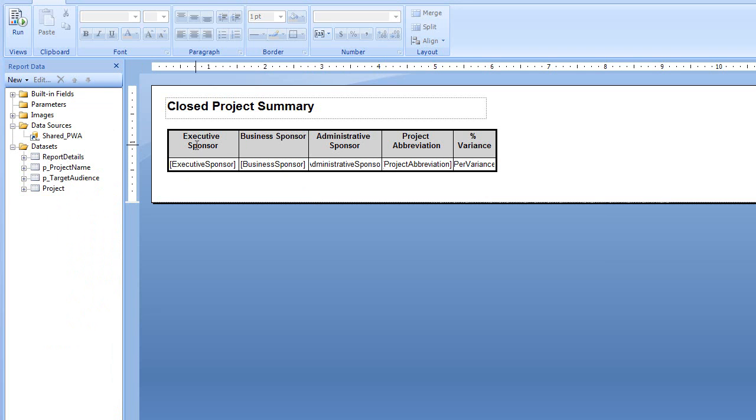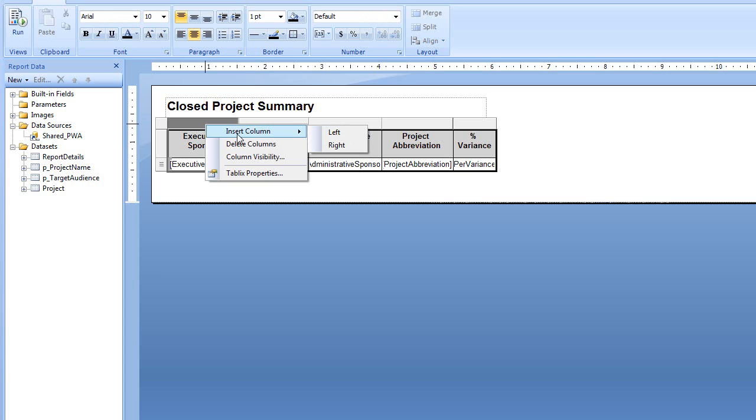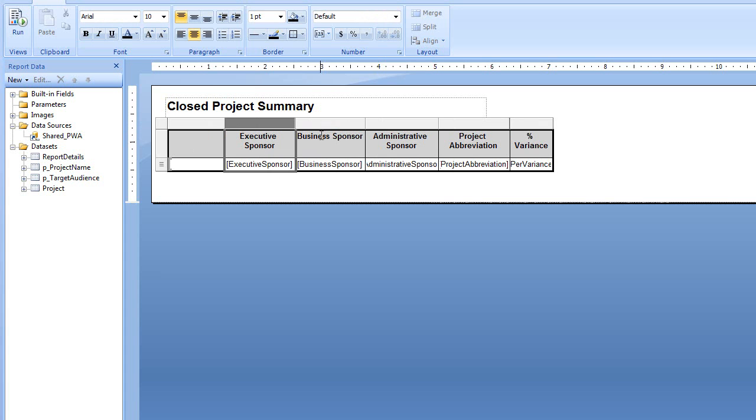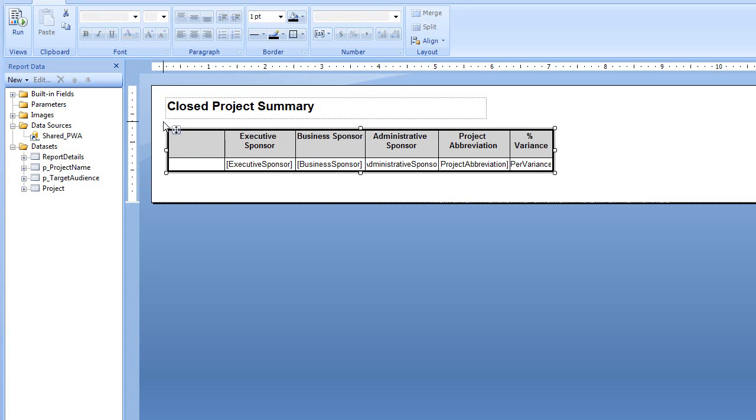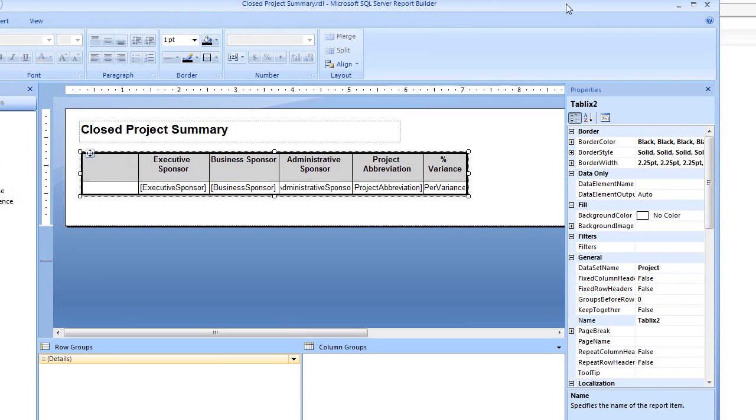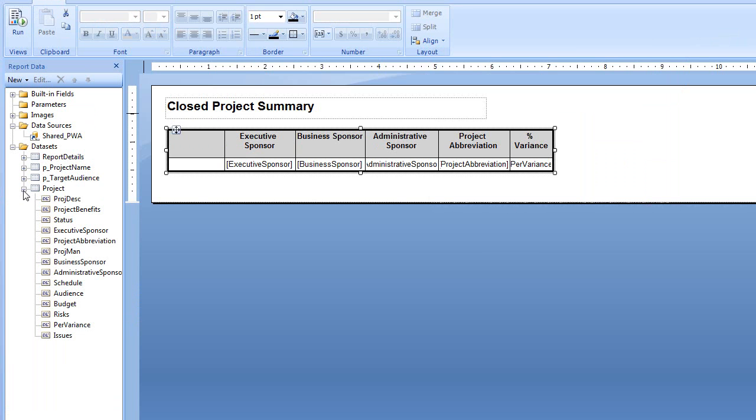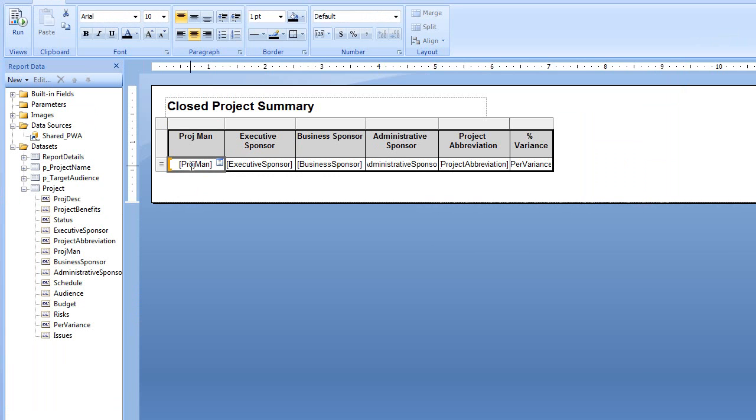So let's go ahead and make a change here. We're going to add a column. Maybe we want to add Project Manager as the first column. So I'm going to choose Insert Column Left and we need to know what data set this is associated with. You can see the data set is a project data set that this table is associated with. So I'm going to choose Project and then there's the Project Manager that we've already written a query for in this data set. I'm going to drag it in and you can see now we have the Project Manager.